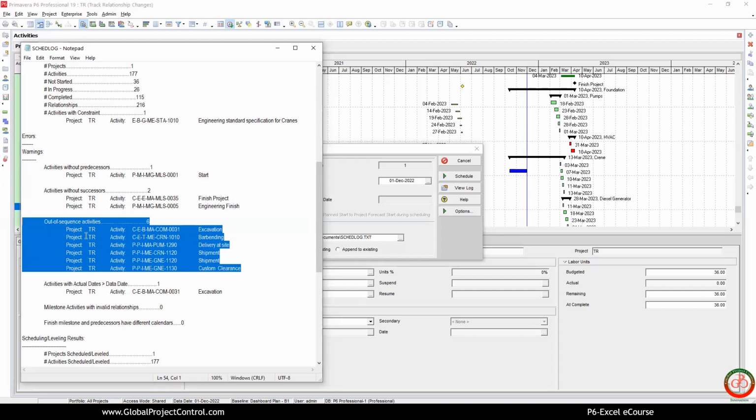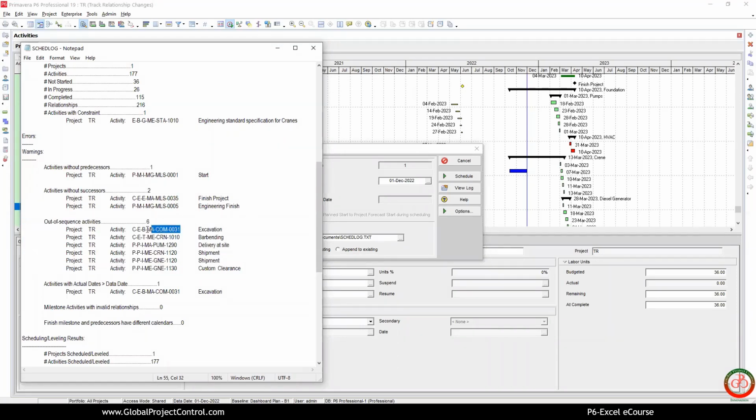For instance, if you need some permission from your client side, then you should send the out of sequence task to your update. Because if you remove the out of sequence, your client cannot distinguish that you did this task by out of sequence.